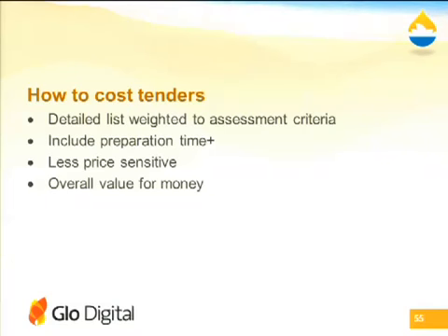How do you cost them? Okay, I think you have a detailed list again. You've really got to work out what's going to be in that list. Use a similar spreadsheet to what we had before, but it's going to be much bigger simply because there are so many more things involved. Include your preparation time. They're going to ask at least five, probably 10 organisations to submit. They get the benefit of all that work from the 10, the 9 that actually miss out, who put in the work. So I reckon they can be charged a bit more.